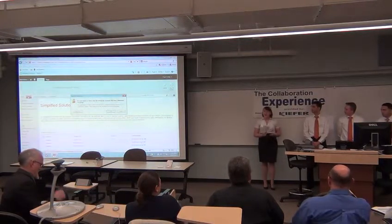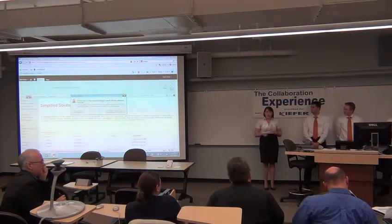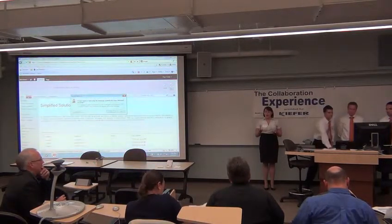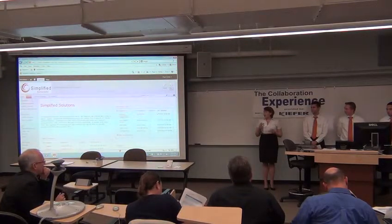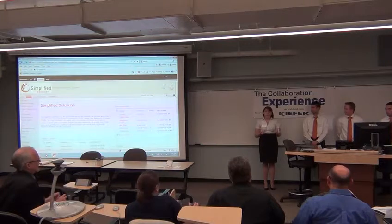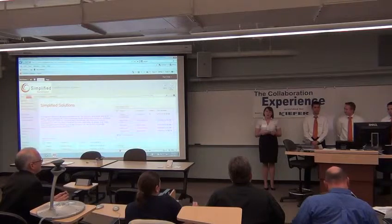Okay, I think one of the things that Joe touched on was the communication log. As students with our cell phones, we're constantly texting and shooting emails because it's convenient, but to truly use the communication log as an archive, really. I know for me, when we were doing this program, I had to scroll through my email and try to find things. Hopefully they didn't get deleted. If we had started utilizing the communication log sooner, I think that it would have been far more efficient for us to just reference that and comment on it. And as Joe said, if you set an alert, then you receive an email anyway, reminding you if you're not as diligent about checking the site. So for us, I think that was one of the top things that we learned, was really to utilize that.